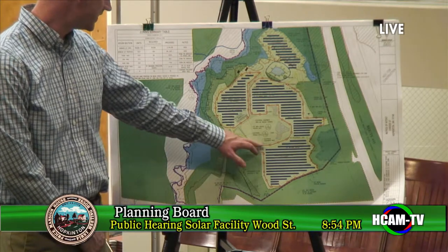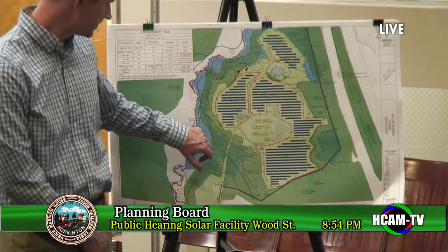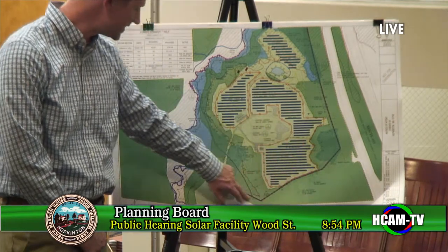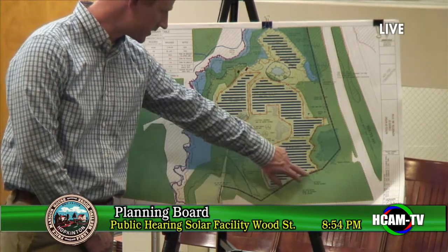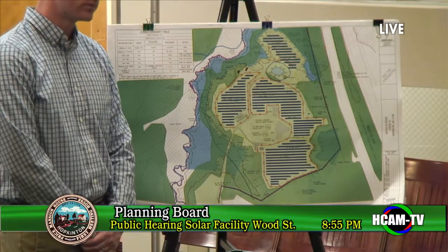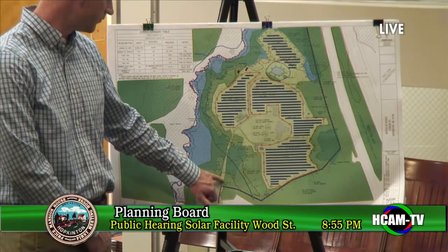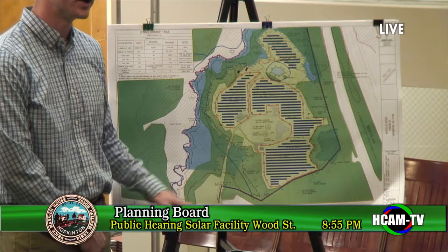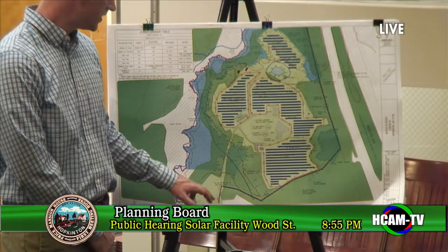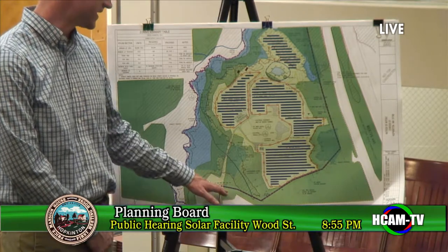Our interconnection is via underground as much as possible. We are proposing underground up until there is a water line easement here. We're actually going to be working with the owner of that easement. Proposed to trench through that, but there may be issues. We may need to go overhead for that, but we are going to be underground everywhere else. What may have to go overhead? The utilities, the interconnection, the electrical line, just in that because of that water easement.